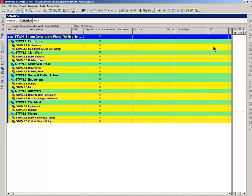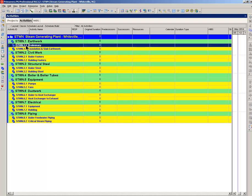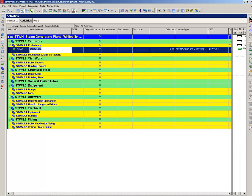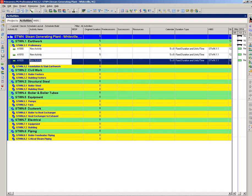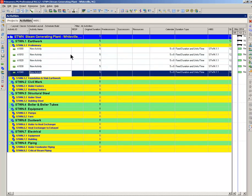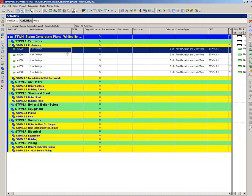So, we shall get started right now. Coming down to preliminary earthwork. Let's add five activities. Coming up to the command bar, upper right-hand corner where the white plus is. Just click it five times. One, two, three, four, five. There you go. You've got five new activities. You could have clicked this 50 or you could have clicked it 500 if you'd like. But you can see we've got activities ordered with increments of 10.